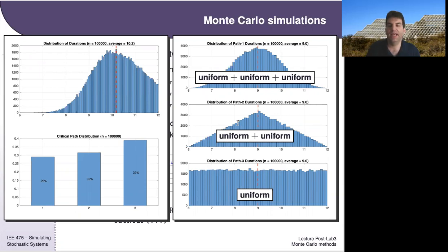If you think about it, both of those things should make a little bit of sense, because how the heck could you get, let's say, 12 out of here? In order for you to get 12, that requires you to get 4 plus 4 plus 4. In other words, the top activity is 3 independent random activities. In order for the sum of those 3 independent random activities to be the longest, to be 12, that requires each activity to sort of be in the unlucky state of taking the longest itself.